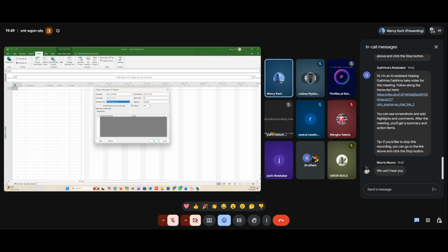So when you receive a letter of award, it clearly states the duration you need to complete the project. And the duration usually begins after you've been handed over the project by the client. So you've gone to site and they have already handed you the site. So the project duration starts from that time. Usually there's 1 week for mobilization, then there's the project duration.